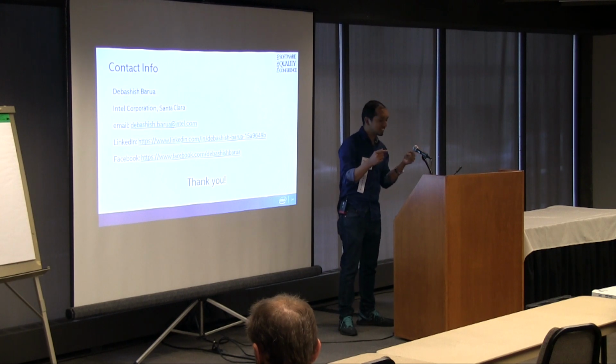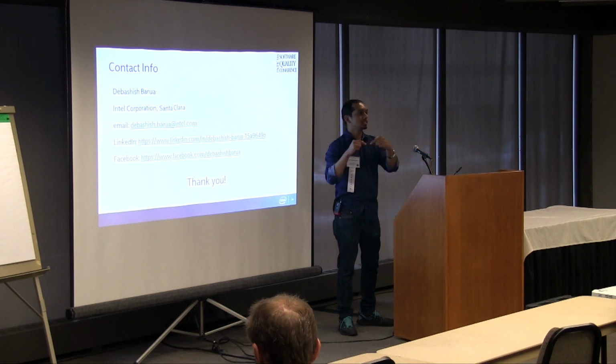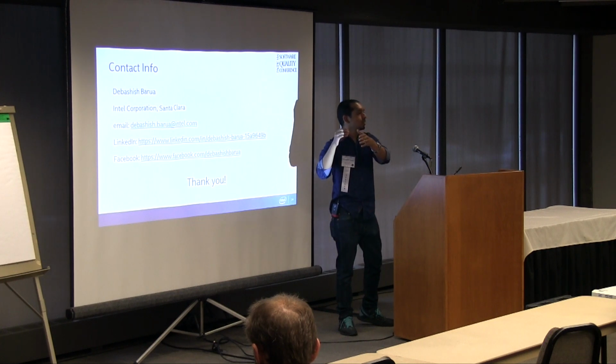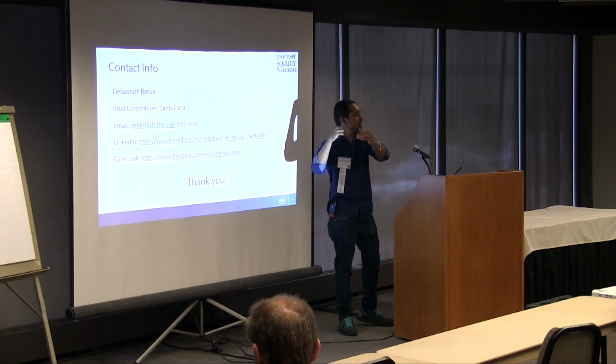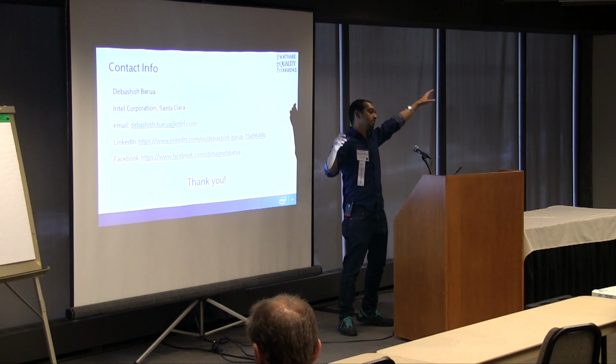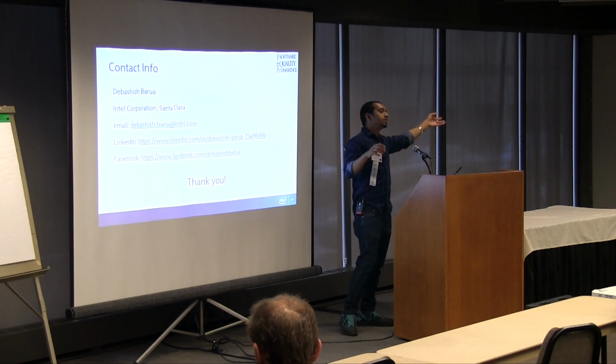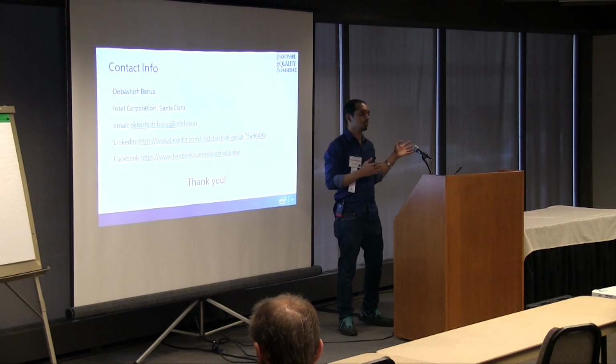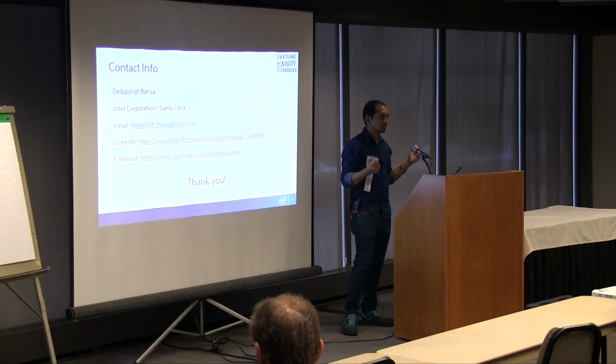By similarity, I mean they were similar in project timelines, or in what the architecture was, how you compare that to some different product, and how much it was different from that. So you need some reference. You cannot just come out with, hey, my parameters are this.